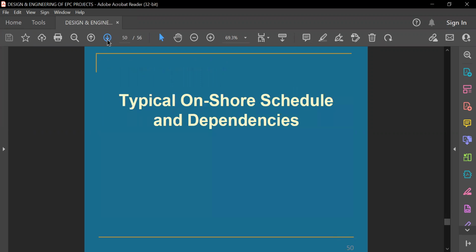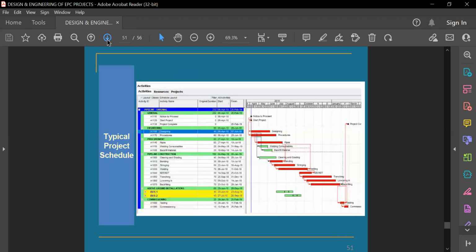And then this is a typical schedule which will be prepared by planning people, project control people, as I told you in the beginning of the session. So this is a typical schedule. Interdependency is shown, and these have the complete levels, like level 1, level 2, level 3, or level 4. A level 4 schedule looks like this, and it will have a complete plan to be executed in a specific time frame. You cannot have the luxury of doing endless engineering. And the interdependency lines are there.